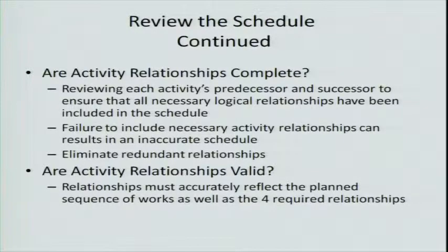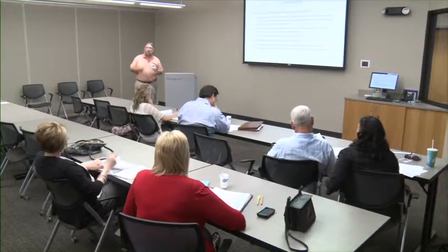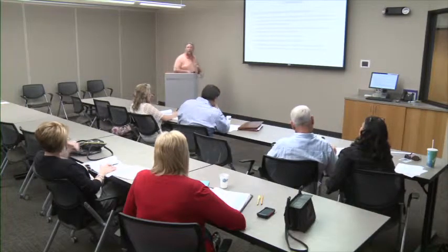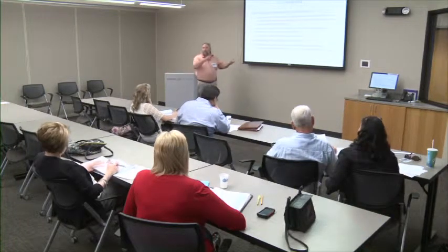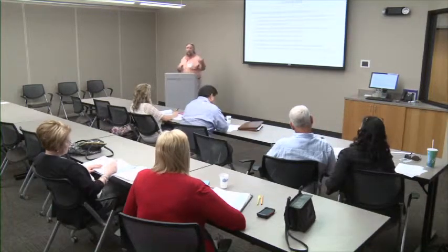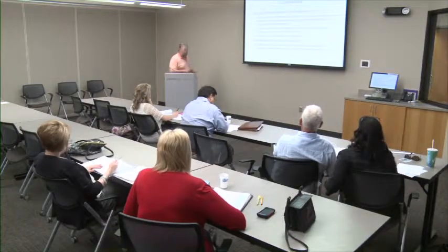If we're talking about painting the room and one of the relationships we have to it is to check the weather outside, is that a valid activity in our relationship to painting the room? Not particularly. But it may be if this is not an air-conditioned room, we have to have a certain ambient temperature to paint in, and so we need to make sure that the weather outside is such that it's not 100 degrees in here when it's 120 outside because the paint won't work. But we want to check that out.